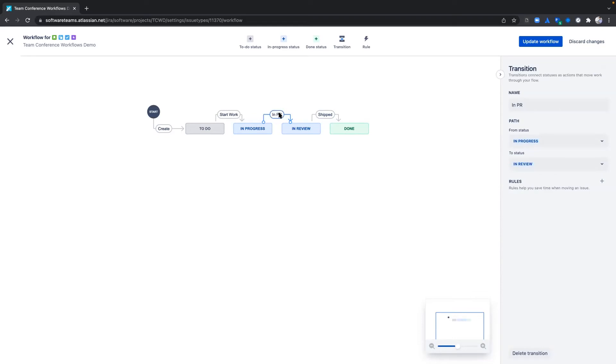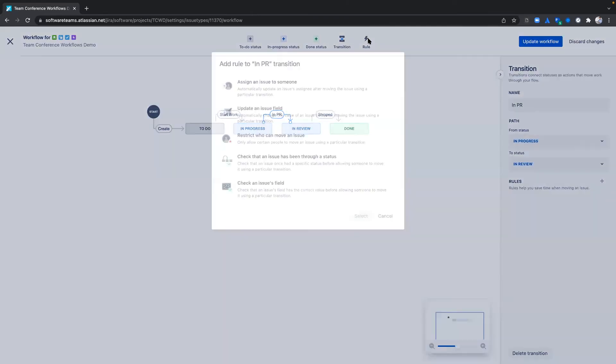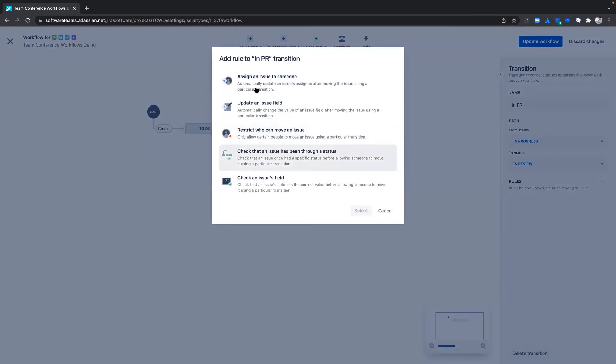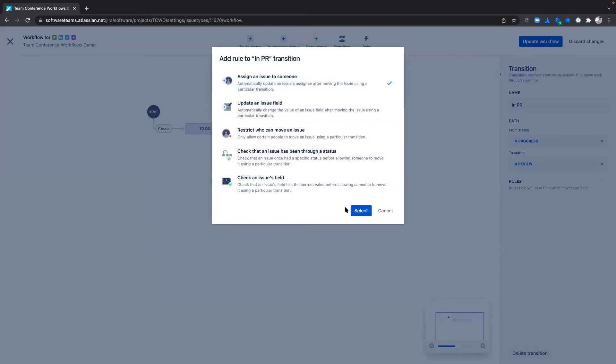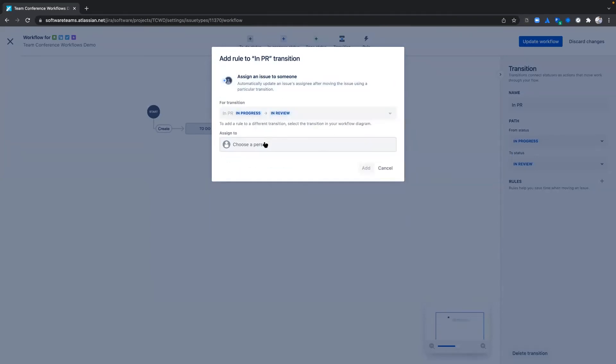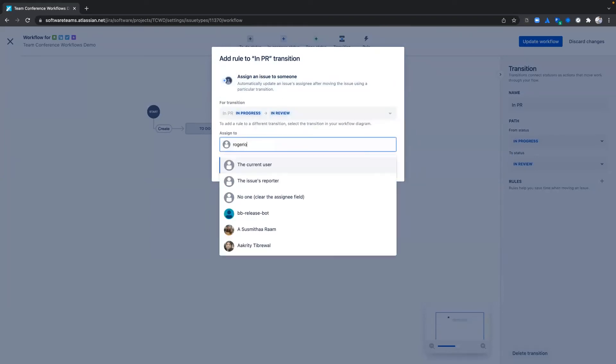Since we only have one quality assurance teammate, I want to add a rule to this transition to make sure my QA teammate Rogerio gets notified when an issue enters the In Review status. Be sure to check out our five available rules in team-managed projects to help make your team more efficient. I'm going to select the first rule here because when an issue moves from In Progress to In Review, I want to notify Rogerio.